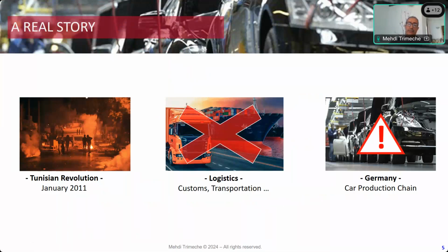To mitigate the supply chain risks, we can imagine many solutions. For example, temporary emergency stock located on the client side, a force majeure clause in the contract to address unforeseen events and limit the liability of parties, a comprehensive insurance coverage to protect against financial losses arising from disruptions, etc. But is it the right or the good solution?